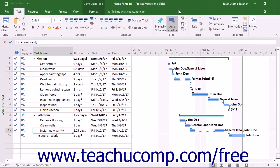You must have saved at least one baseline copy of the project file to show earned value analysis results. You must also have accurately recorded the actual work and costs in the project file.